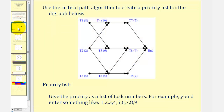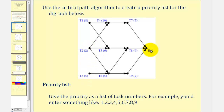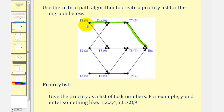Let's take a look at our example. Our goal here is to find the priority list using the Critical Path Algorithm. To begin, we want to find the critical path starting at tasks one, two, or three that takes the most time to reach the end. For example, if we start at task one and go from task one to four to seven to the end, the total time would be eight plus ten plus five, or twenty-three hours.